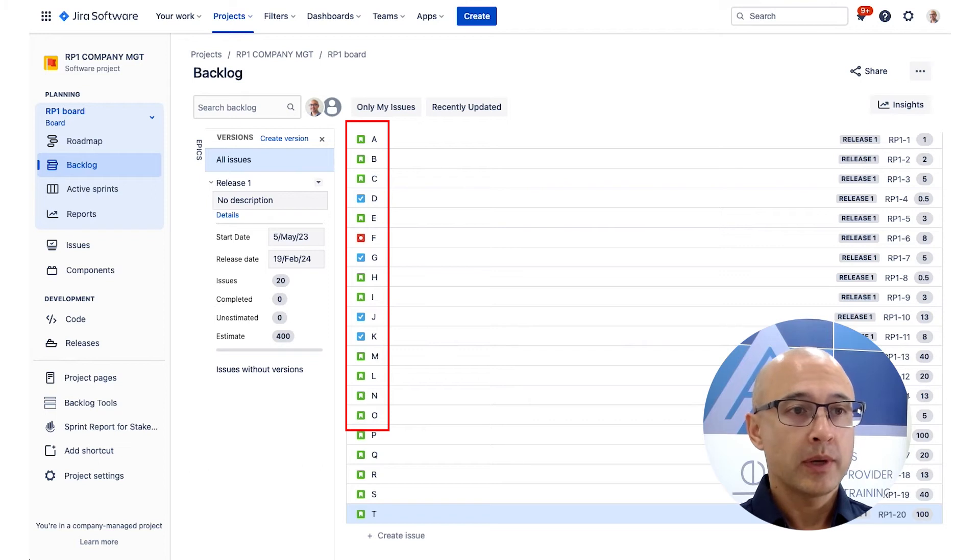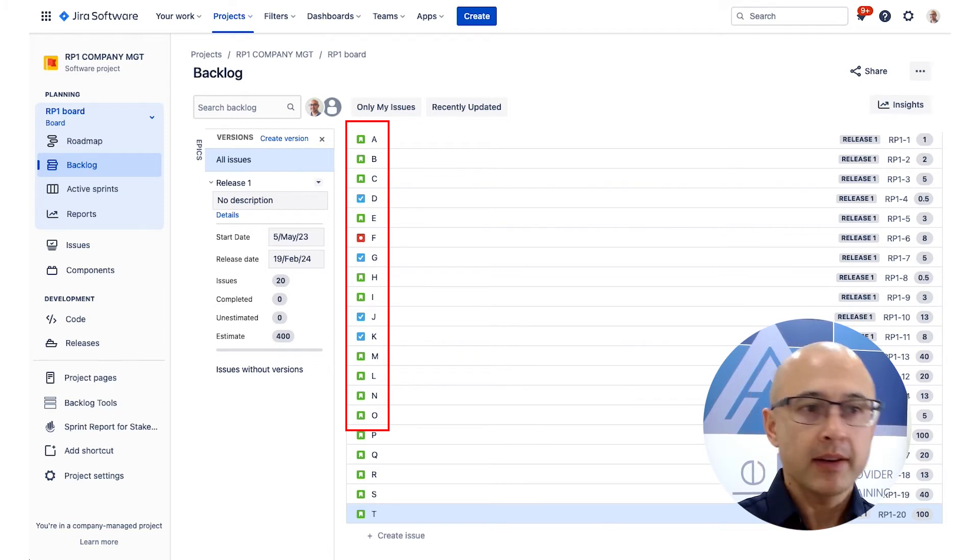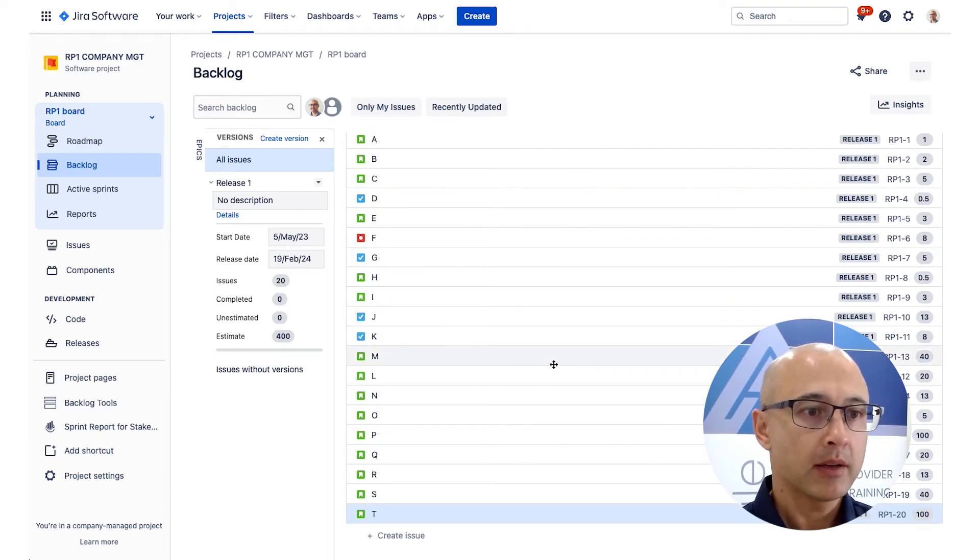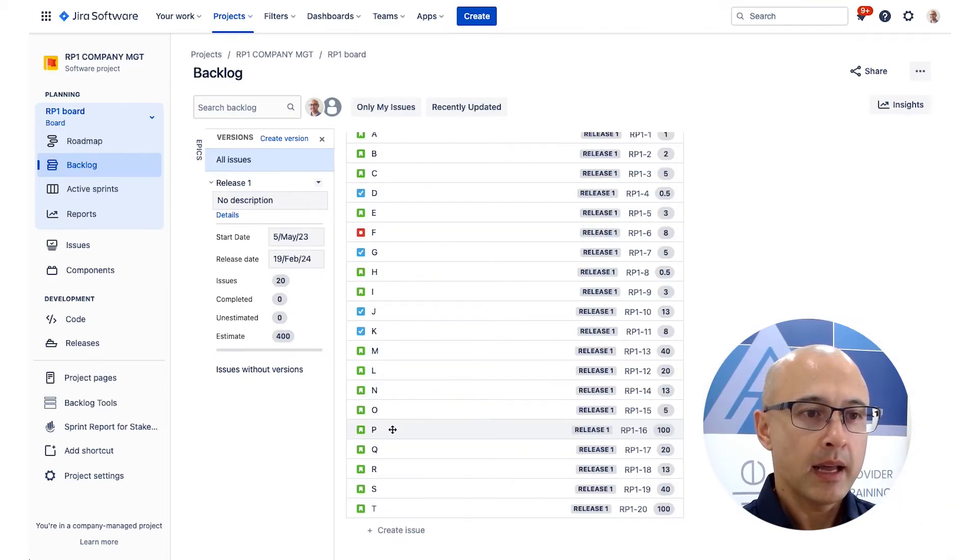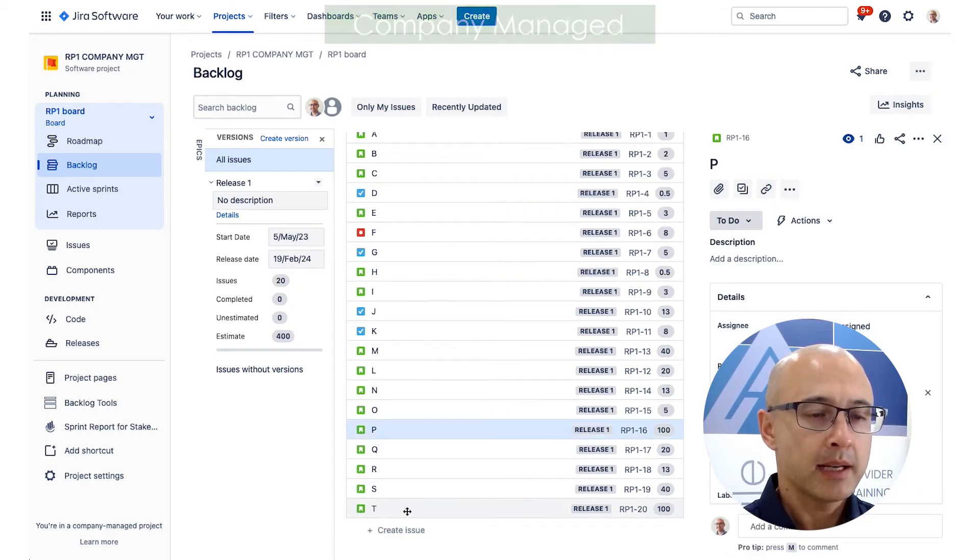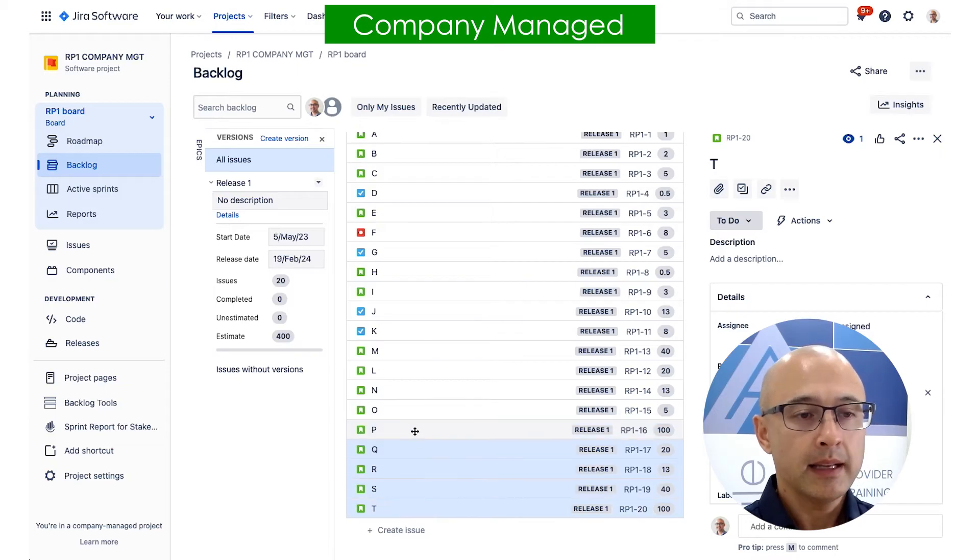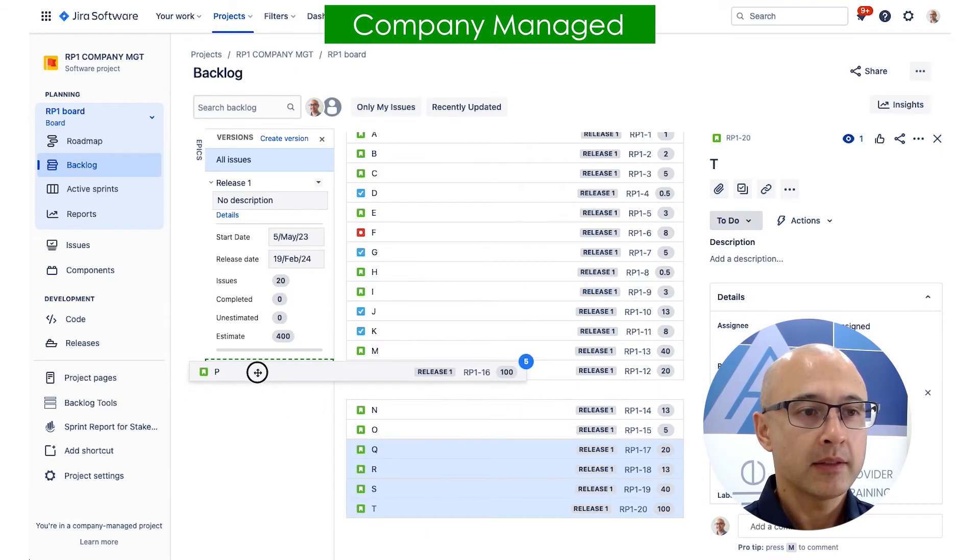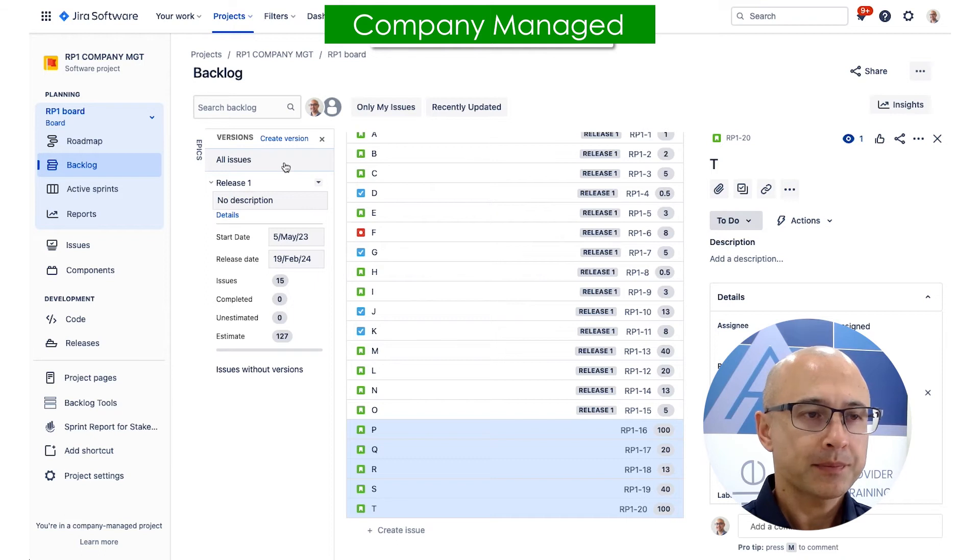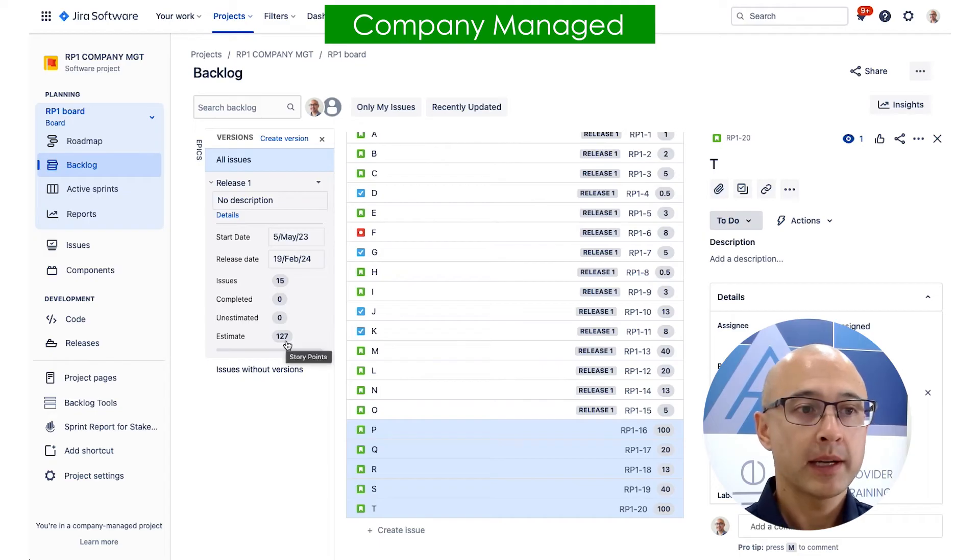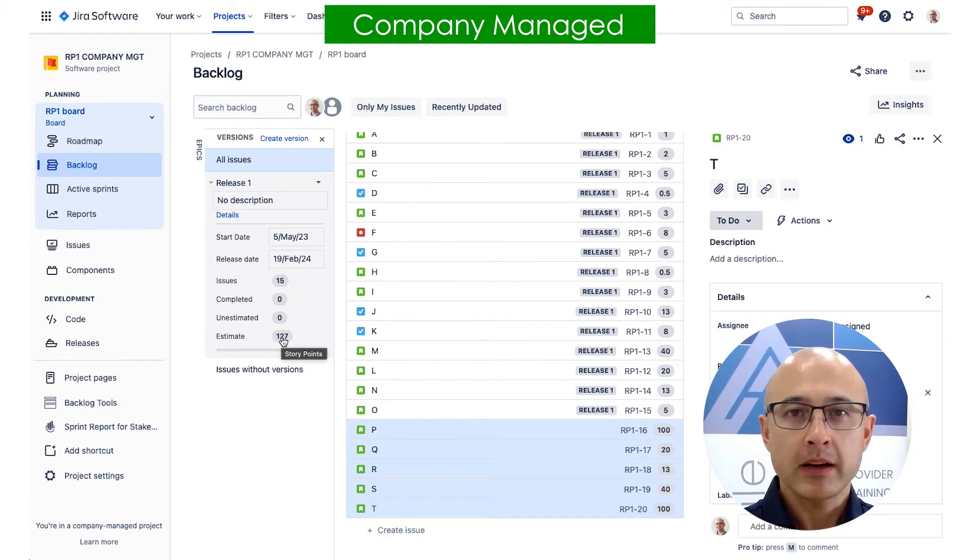So what do we do? Well, basically, we're going to take everything after O out of this release. So looking at our JIRA product backlog here, how do you do that? Basically, like we did before, I'm going to take every item below O, so P through to T, I'm going to hold the shift key down, click on T, and then I'm going to drag these items to issues without versions. And then you'll notice that they get removed from that release. And I also have an updated estimate here. So instead of it being 400 story points, we now have 127 story points.